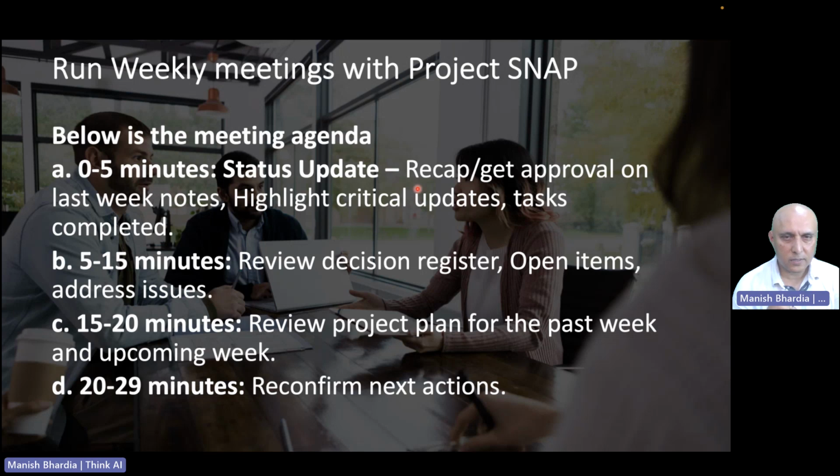So we just want to make sure we always recap in the meeting, and that last 5 minutes will go in the meeting notes. That is why it's important to recap last week's meeting in the first 5 minutes and recap this week's meeting in the last 5 minutes and send that in the meeting notes. If we do this, we'll be golden. 20 projects, 50 projects, does not matter. We can run every project the same. Everything is in the right place, and we have full control. As I said, win-win-win situation.